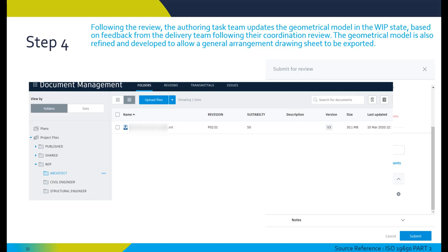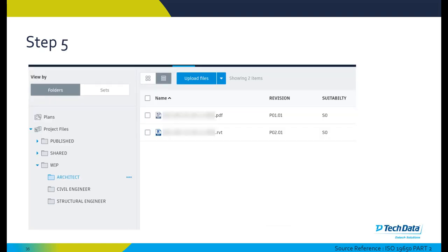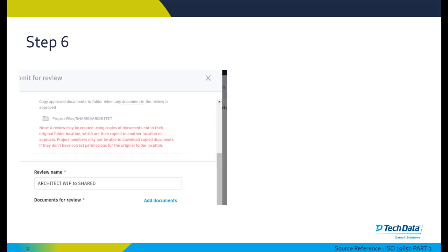Following the review, the authoring task team updates that model in the work in progress state based on feedback from the delivery team following their coordination review. The model is also refined and developed to allow a general arrangement sheet to be exported. The drawing is assigned a status S0 and saved to BIM 360 with a metadata revision P01.01 until it's ready to pass its quality assurance check within the task team.